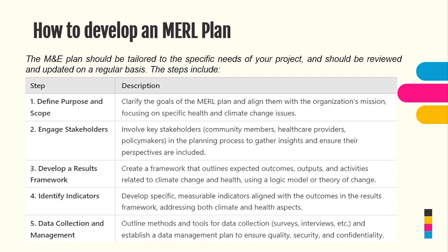Engage stakeholders. Involve key stakeholders, could be the community members, healthcare providers, policymakers, in the planning process to gather insights and ensure that their perspective is heard. So for example, one would ask, why should I engage them? If you want to implement a project in a health setup, you'd want to engage the healthcare providers so that you understand what are some of the data sources, how is data moved from the community to the facility. You just want to get those basic information so that it helps you to structure your approach on how you're going to support that facility with regards to data collection or data analysis.